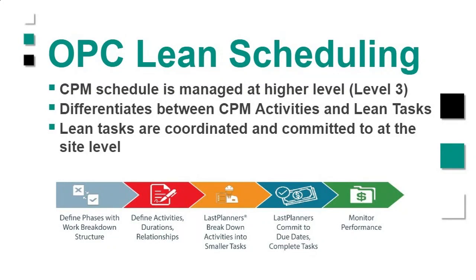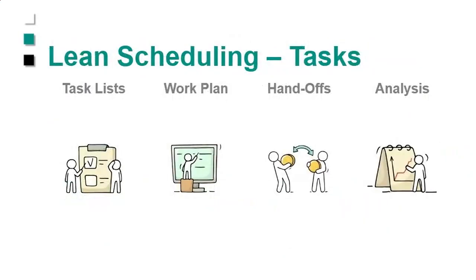So most of us, if we're using P6, we've got to dig into a high level of granularity in the activities because it's not easy to expose the steps. This gives you a different flavor, different option, especially as an owner. You may choose just to go to a level 3 in terms of the activities and do the heavy lifting of level 4, level 5 detail, so more detail in the lean scheduling components. So that brings a different potential aspect that might make sense for your team.